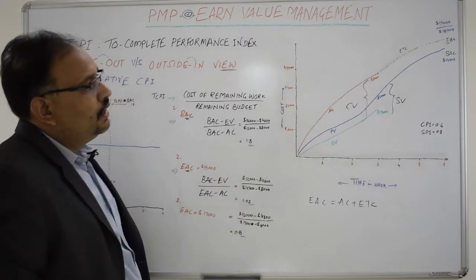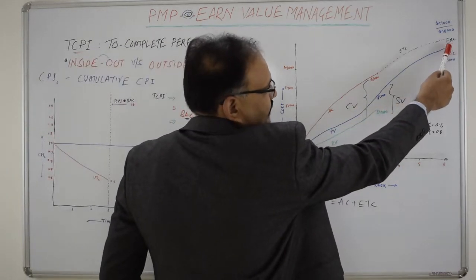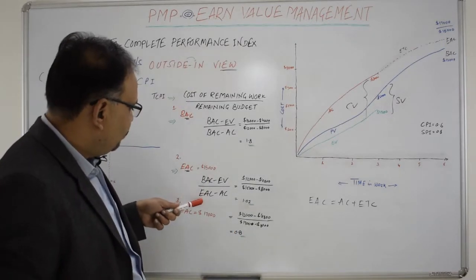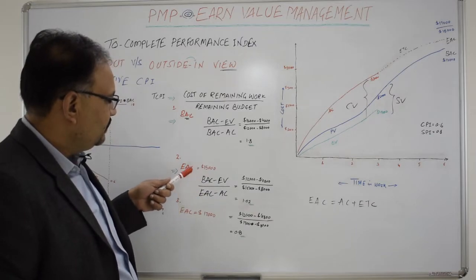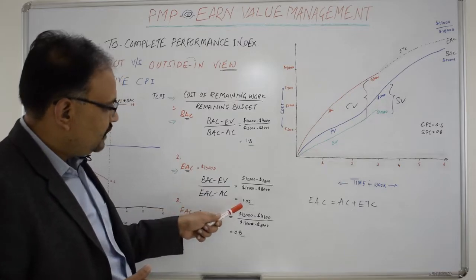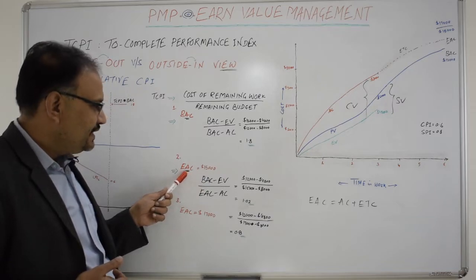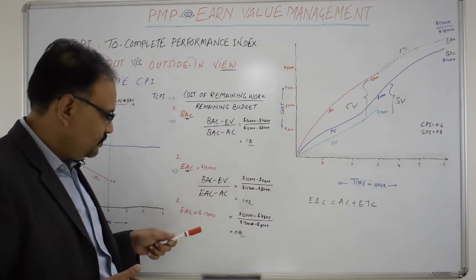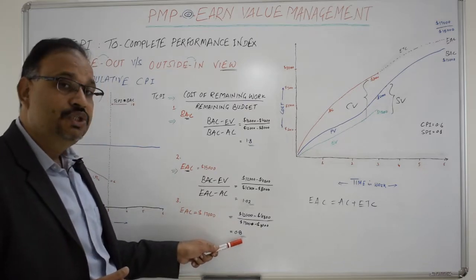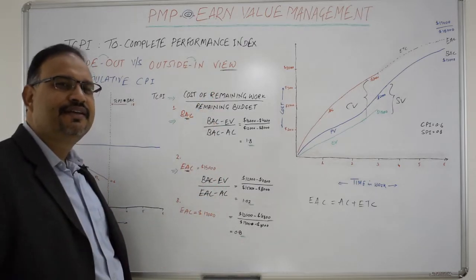If the BAC is revised to an EAC of $15,000, the formula changes to (BAC minus EV) divided by (EAC minus AC) — the only difference being EAC replaces BAC in the denominator since we're now considering a revised budget. The TCPI in this case comes out to 1.02. If the EAC is further increased by $2,000 to $17,000, the TCPI comes out to 0.8. These three scenarios illustrate the calculation aspect of TCPI.